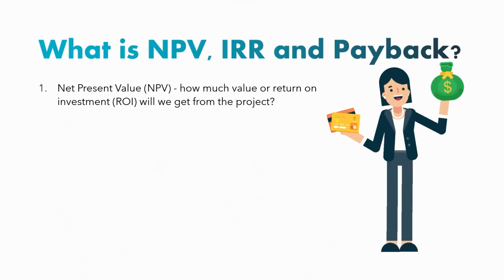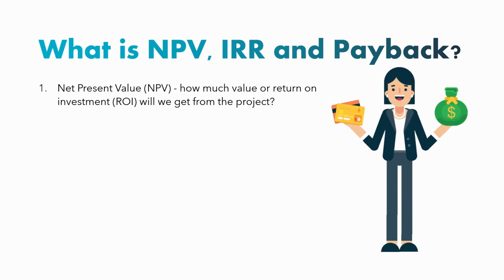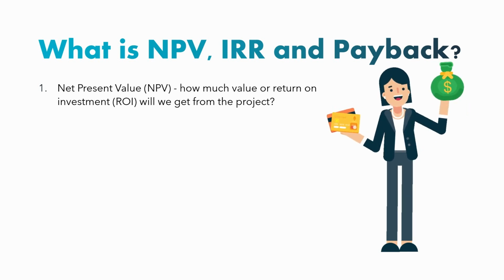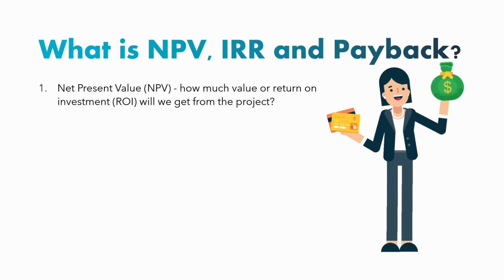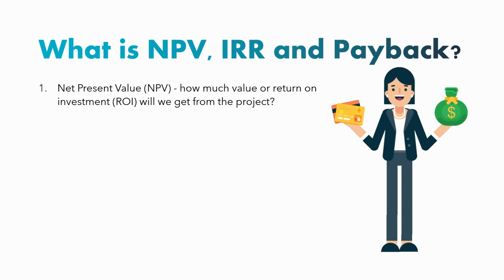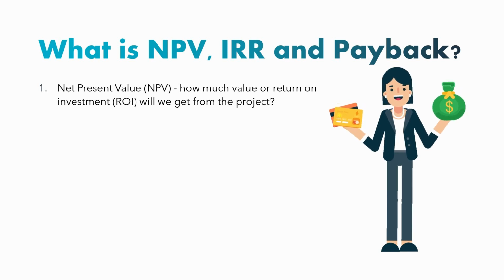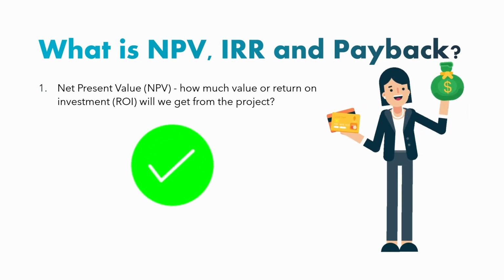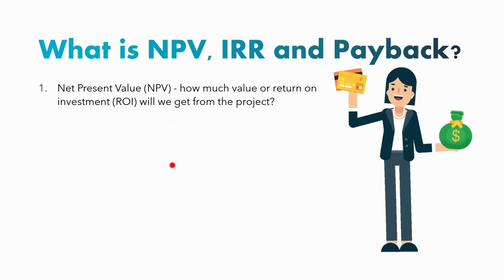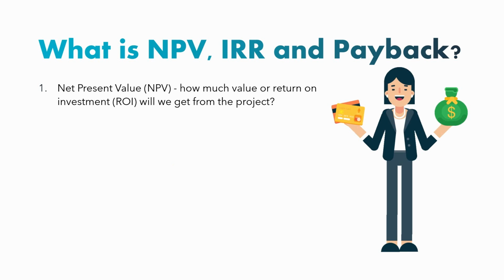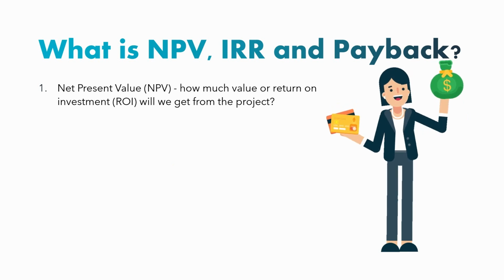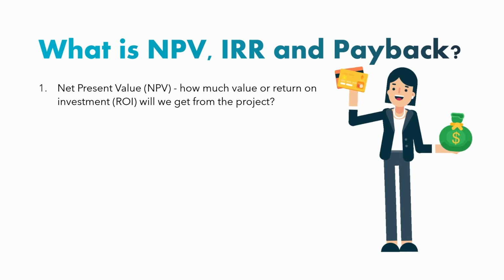Net present value. How much value or return on the investment you will get from a project. So in simple terms, if the NPV is greater than 0, accept the project, or if it's less, then reject it. Now, with NPV, we need to consider the time value of money concept, i.e.